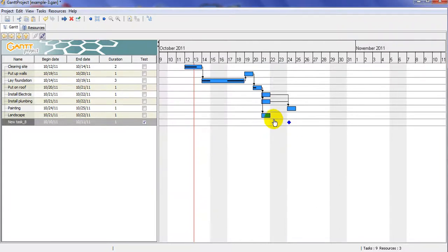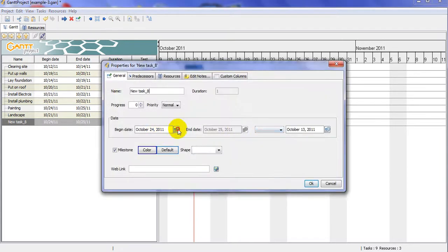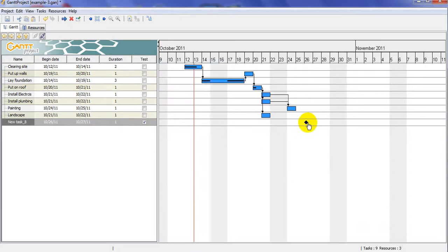But the problem here, if I add this one, for some reason this version sometimes doesn't give you, depending on where the milestone is, the path. So I give you an example. If I move this one from 24th to 26 or 27, and I discovered that from even an older version, then by clicking the path, it doesn't give me the critical path, because somehow in the coding it thinks this is not correct and not feasible.